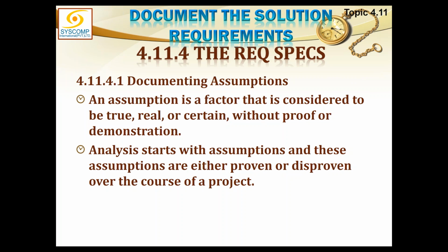Analysis starts with assumptions, and these assumptions are either proven or disproven over the course of the project. And as soon as an assumption is proven wrong, you must replace this assumption by either the factual data, if it becomes available, or with another assumption which is likely.